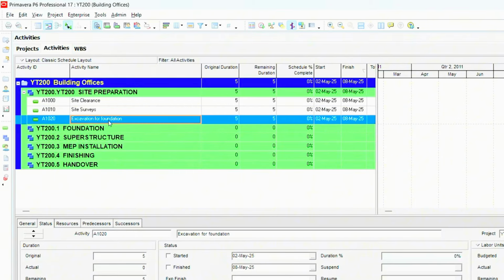Copying and pasting is very relevant when you've already added all of the resources and all of that, and you don't want to go into the same process. Maybe the activity you're trying to copy and paste for is going to have the same resources, the same amount of money and stuff. But that's why I don't always copy and paste, in case the activity I'm copying into doesn't have the same resources. If you copy and paste it, everything you've put together in that copied activity is going to be pasted in the next one. What do I mean?